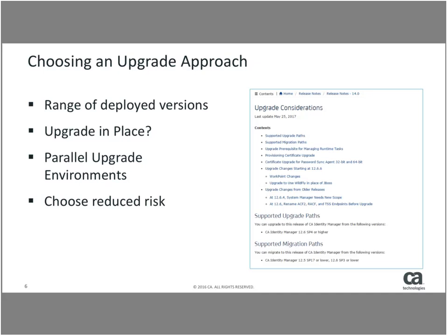You essentially have to have a maintenance view of your production deployment to be able to update those components: a new database, a new setup of application servers running the new instance of the application itself, the Identity Suite components, and migrate the objects, the policies, as well as the directory objects over into a new environment. What you don't want to do is disrupt your identity management availability.